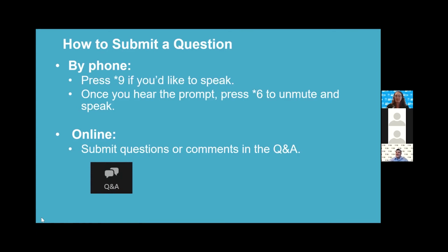I think I'm okay. During construction, the bike lanes will be detoured from 9 to 4 while construction is in place. It is open to through traffic, but we would like to know how much space there is going to be when we're in construction. After the construction hours have passed, we're going to be opening it back up for the bike lanes. During the week from 9 to 4, we would be having closures while work is going on. If we can provide adequate space to have the bikes going through while we're working, they'll be open. But at this time, we plan to have them closed and then opened up once work is done. They won't remain closed. They'll just be daily closures.